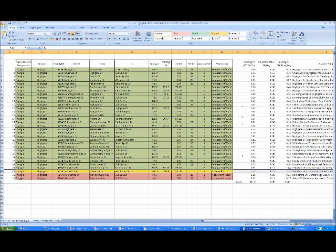So the next thing that we did is we looked at a GIS map with a contractor, and we said, okay, in what order would you guys do these mobilizing to this area? So we sorted these in this first column, which is the order in which they're going to do them. So they said they would do the section of Highgate first, and then they would move on to St. James Court, and then back to Highgate, and so on.